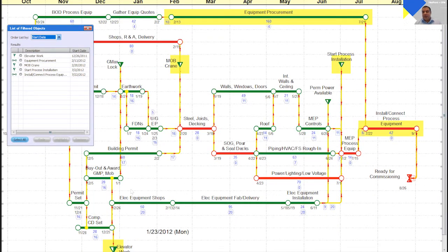You also see 2 milestones, or actually 3 milestones, that have drift, and that is because they do not have a predecessor that they will connect to eventually. So it will fall back earlier in that case to the early start dates, and that will be the project start for these milestones.